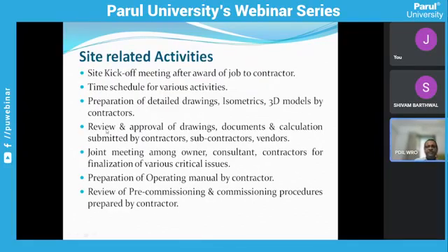These are the site-related activities, because for the process engineering design project, one part is the activity done in the design office by the entire design team. Once the contractor has been awarded the project, that means the job, they will be starting their activities at site. That means site activity will have to be initiated, and there will be another kickoff meeting after the award of the contractor, and then the time schedule of the activities, all these things are done.